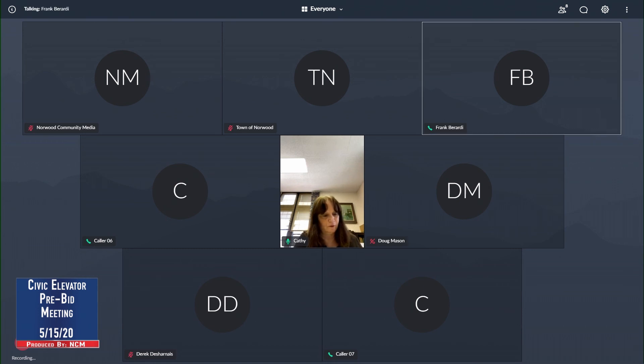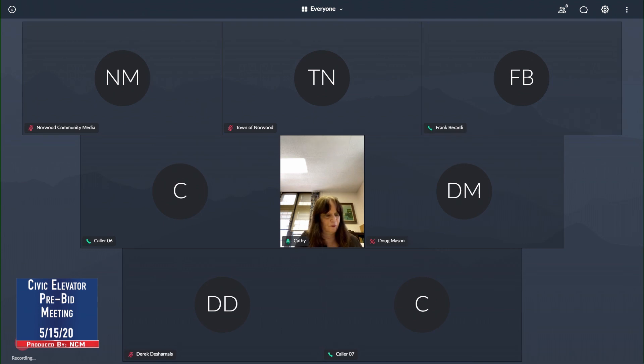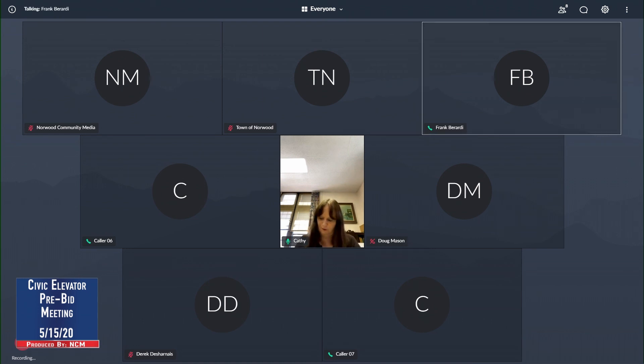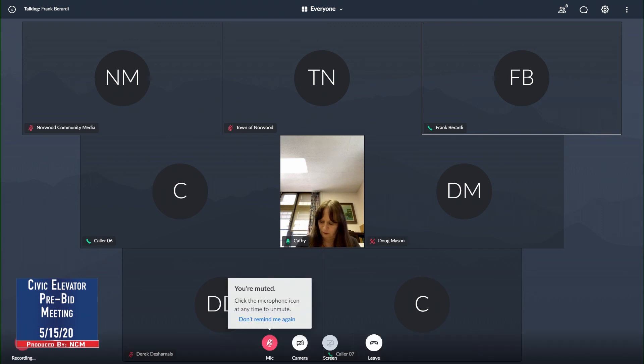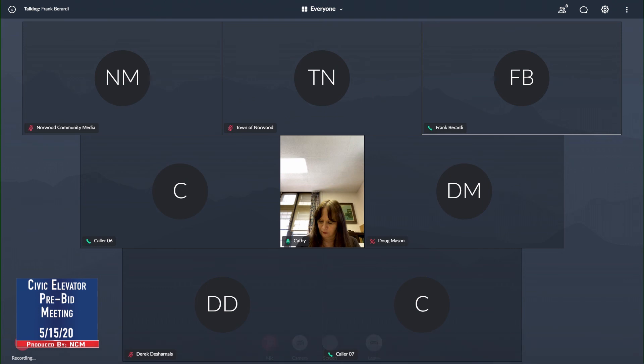New door equipment, new door operators, protector edge, so on and so forth. We're going to need a sump pit and pump in the elevator pit to comply with current code there. You'll be tying it into the existing sump pump system that they have. The building does have a generator, so it will be required to do a pre-signal to tie into it, and that's shown on the drawings as well.